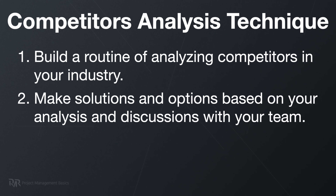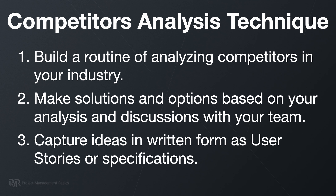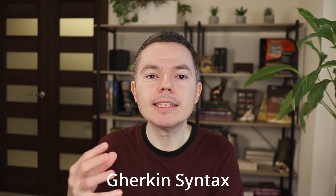Through discussions with your team and through analyzing competitors and industry documentation, you will come up with solutions and options. You want to capture them in written form as user stories or specifications. I recommend that you combine the generic user story with Gherkin syntax to describe the acceptance criteria and the details of the user story.